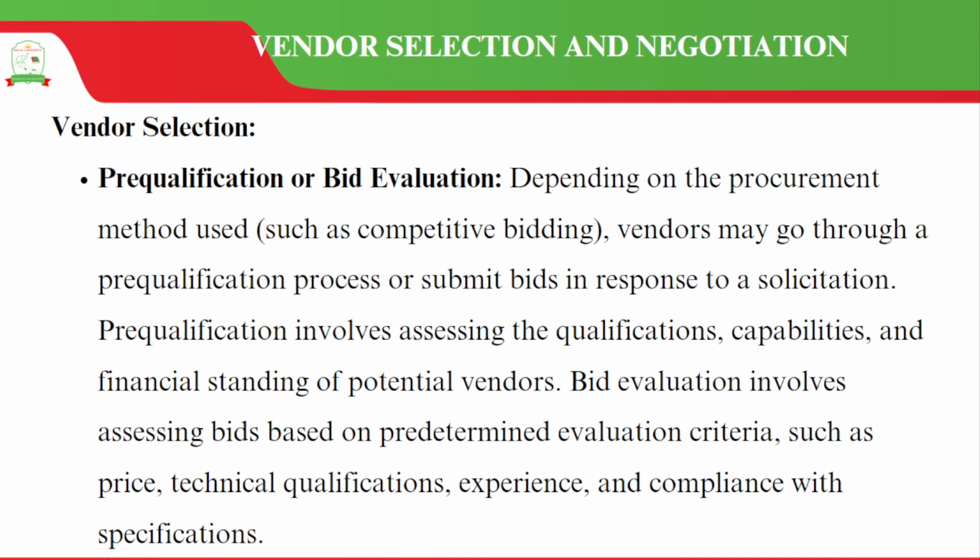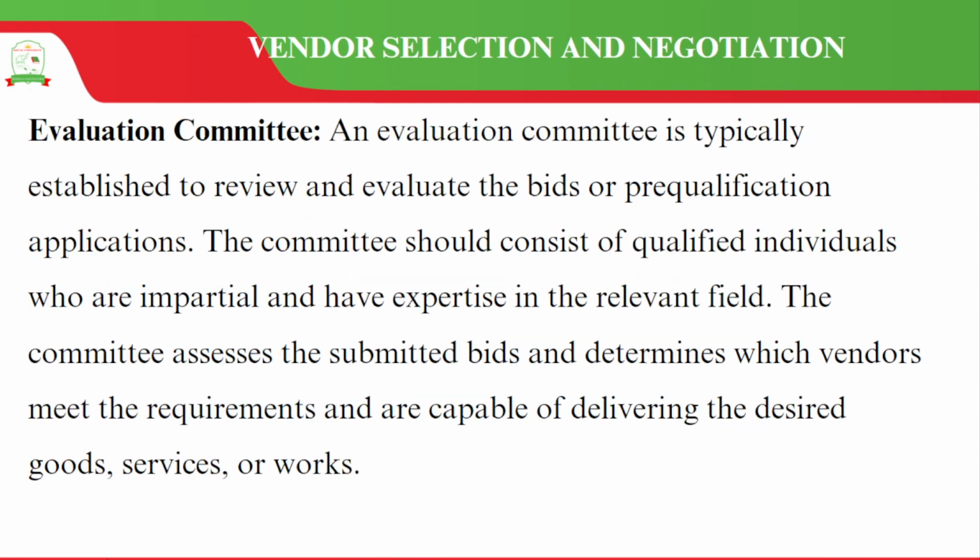And when we are talking about pre-qualification, it involves the organization assessing the qualifications, the capabilities, the financial standing of potential vendors. Bid evaluation also is going to involve assessing bids based on predetermined evaluation criteria. And this is, of course, the criteria that the organization has set, which could revolve around the pricing of whatever is being bid, the technical qualifications, experience, compliance with specifications, and so on and so forth.